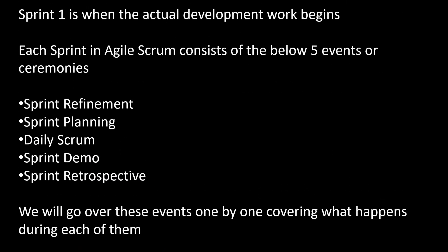Now we continue the story with Sprint 1. Sprint 1 is when the actual development work begins. Each Sprint in Agile Scrum consists of the following 5 events or ceremonies: Sprint Refinement, Sprint Planning, Daily Scrum, Sprint Demo, and Sprint Retrospective. We will go over these events one by one, covering what happens during each of them.